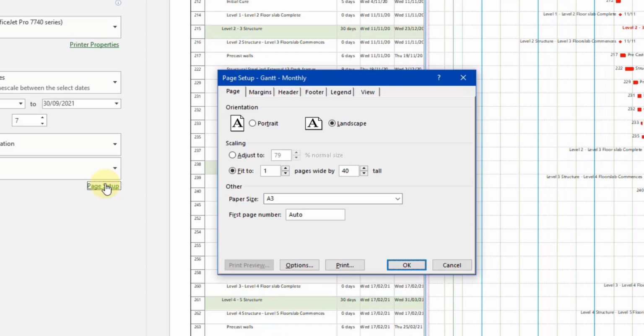But again, as I'm printing out, I'll look at the print and see how readable it looks before I actually go to set it to print. But with the critical path, obviously critical path is much, much shorter, and I will generally try and get critical path into a one-pager or 2 or 3 max, depending on how much information I've got to get over and how big the program is.